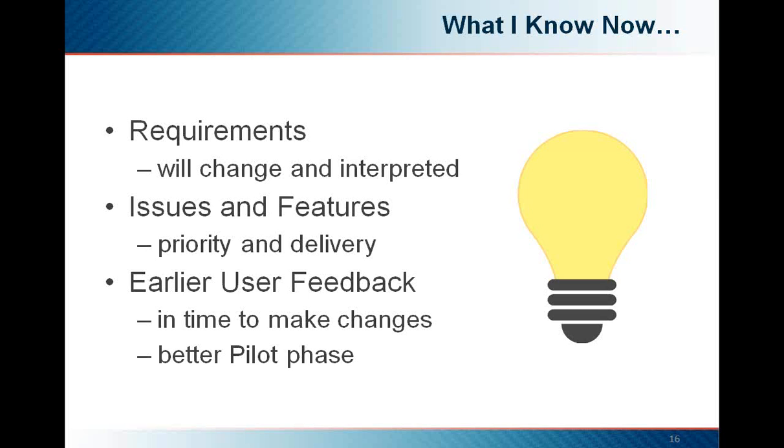I pulled all this together, brought it to the client, and in the first day they nearly threw me out. However, after working on it for a couple of hours, we started making small changes to the process flows and wireframes. By the end of the visit, I returned with the high-level requirements that allowed the team to continue. The client could not come up with an agreement on the requirements from a blank sheet of paper, but after seeing their mocked-up solution, they were able to provide the feedback to make the system more like what they needed.